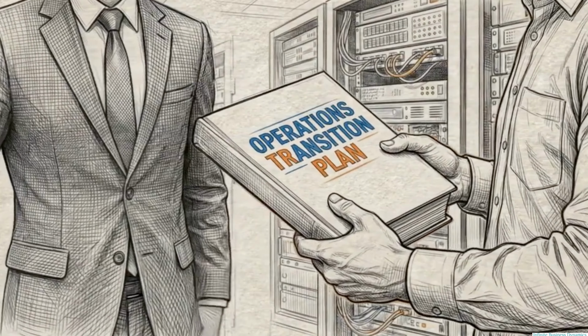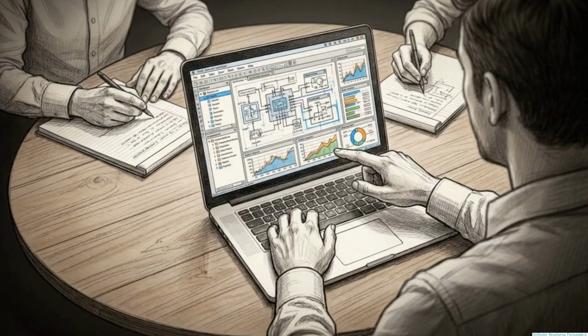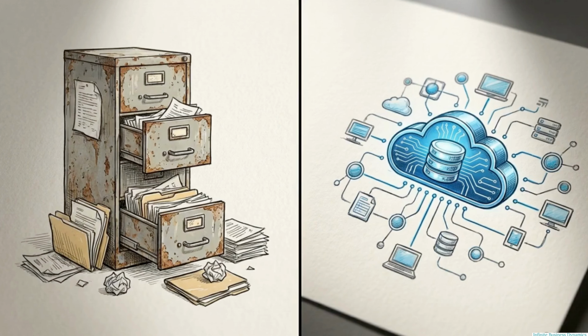The team transfers the capability directly to operations. Your jurisdiction as a project manager extends past the technical go-live date. Dropping a deliverable onto a server and walking away ignores the core mandate of value delivery. You must track benefits realization in the post-closure environment. This requires formal transition planning, ongoing training, and actively reinforcing new behaviors among the end users. A project is complete when the new operational behaviors have replaced the old ones.